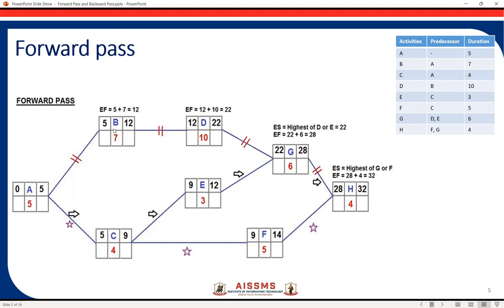Now we need to calculate the early finish. For B: five plus duration seven equals twelve, so the early finish for activity B is day 12. For C: early start five plus duration four equals nine. So activity C can be finished at earliest by day nine.